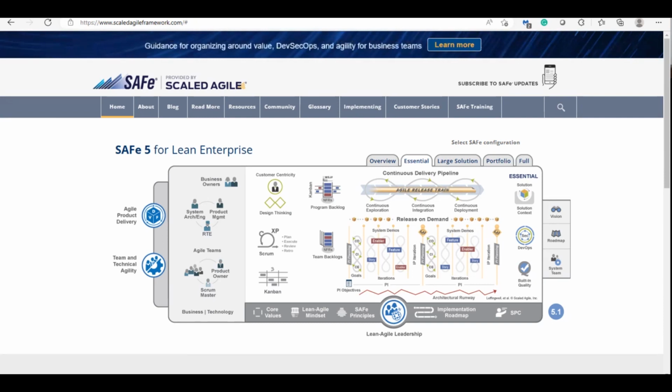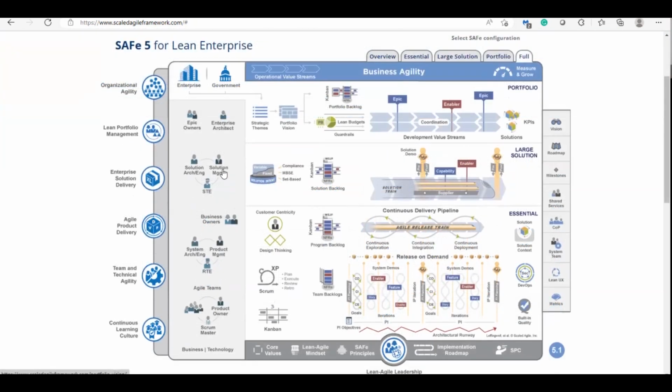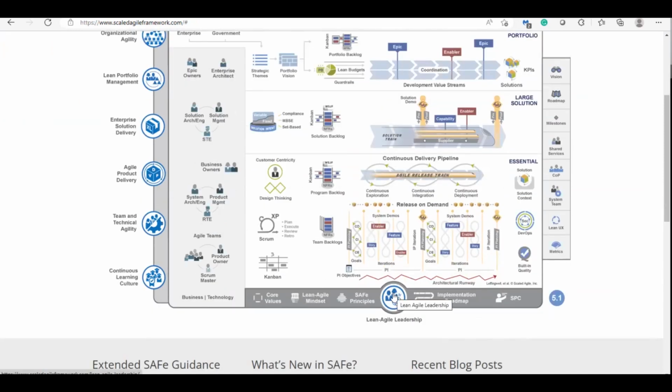What is the specialty of PI planning? Everybody will understand. Everybody will come to know what everybody is doing, from the developer, product owner, scrum master, senior developers, lead, architect, everyone, my dear friends, till the stakeholders. I can say, till the solution-level architect, till the higher levels, portfolio level, will be involved in that meeting, in that planning. We call it a meeting, a 2-day planning.